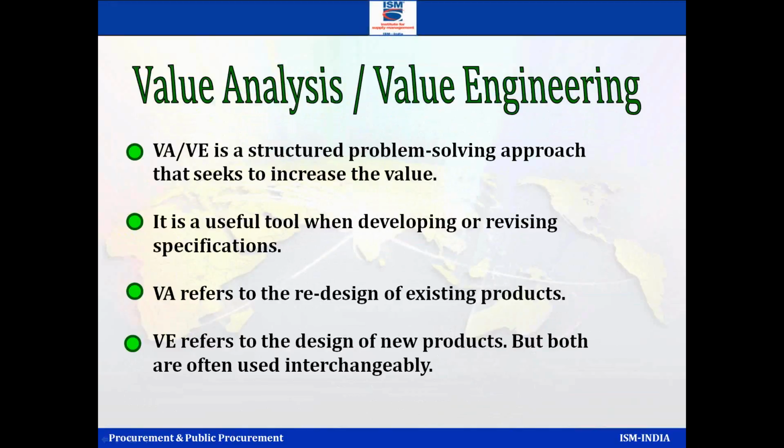Next comes value analysis and value engineering. Value analysis is done once I'm doing procurement. I go to the supplier, and the supplier tells me this is going to cost you so much. But if you allow me, I can change the material. It will serve the same purpose, give you the same finish, the same look, but the cost will go down. That's what we call value analysis. Without compromising the values, if I can make some changes, it's called value analysis.